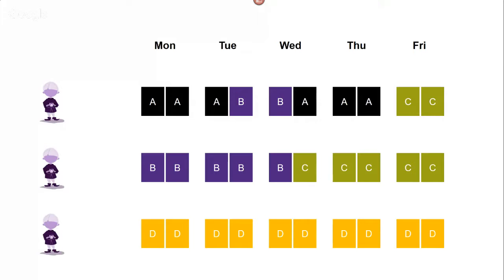And then we have Robert, who's working on project D. He's the machinery specialist, a lot of experience, a very technical guy, engineer. He knows about micro transistors and things like that. So he can really focus on that. And he's going to be our go-to guy for project D. Now, the problem with this schedule is that if Robert gets sick, project D is stuck because there's nobody else who's working on it, nobody else who knows what the project is all about.